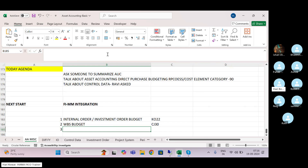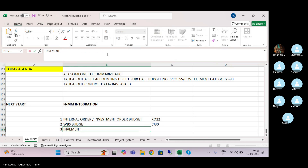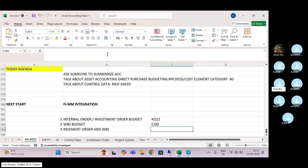You can combine your investment order and WBS and do the budgeting together. That combined investment order and WBS budgeting you can do from IM52.